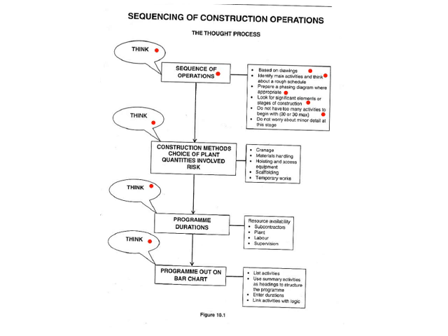I've seen that many times on projects where you're so focused on the details that you lose sight of what the whole picture should be. Then do not worry about minor detail at this stage. So when you're sequencing, look at your basic items. But then your construction method, choice of plant, and quantities follow.